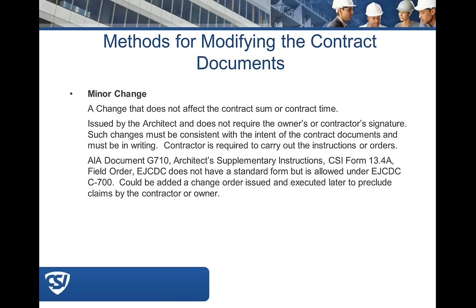What you need to be aware of is that supplemental instructions should not include scope that would change the contract cost or contract time. It's usually just a clarification of information already in the documents. It can include drawings, specifications, or other types of sketches.